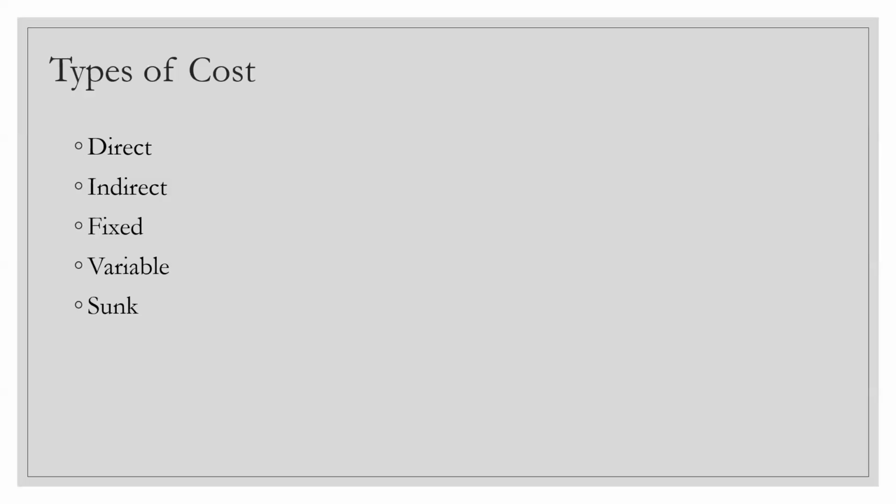A common question that comes up is, what is travel cost? Now, travel cost is a direct cost to the project if it has already been discussed with the customer, and most of the time in the beginning, when the cost is being drafted, the travel cost and a little bit of training cost are always to be considered in the budget of the project.